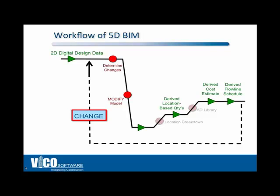You're using the model data, and it turns out to be a great handle — a fantastic filing cabinet. For example, if we've added more space to the second-story sub-grade parking garage, that's going to flow right into an impact on cost and schedule. Now, it's not as simple as clicking a button — I'm not pretending that — but it is this automated, and this is the path most of our users take. It is this repeatable in terms of turning answers around quickly and sitting in front of the owner and design team to show them the impact on the design.